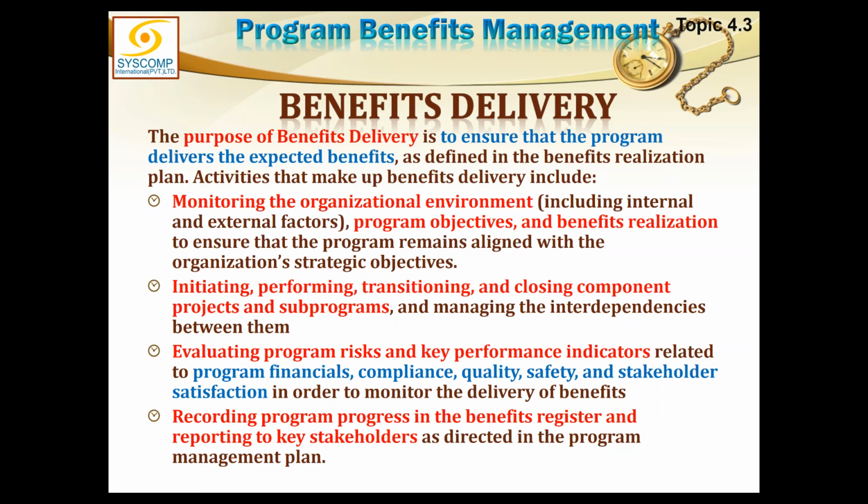Evaluating program risks and KPIs related to program financials, compliance, quality, safety, and stakeholder satisfaction, in order to monitor the delivery of benefits. Recording program progress in the benefit register and reporting to the key stakeholders. So we do have a benefit register.